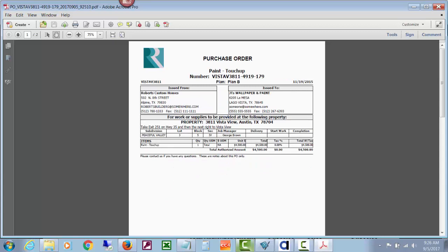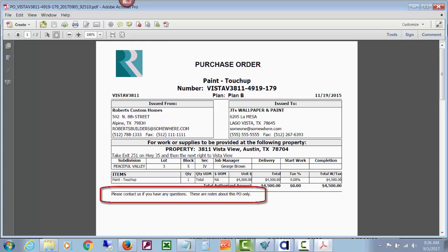This block of information about the price, etc., is put in by CHS, and then any notes that you wrote about this PO, you can see there's those notes that I just typed in. And don't miss the part about how you can set up default notes to drop in, like you might have a bunch of notes that are particular to framing labor or something, and you attach that to the cost codes, PO defaults for the cost codes, and watch the videos about that earlier. So you're not putting those big long bunches of notes in for something like framing, etc.